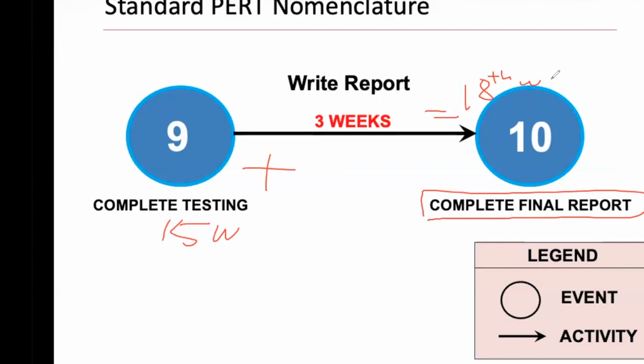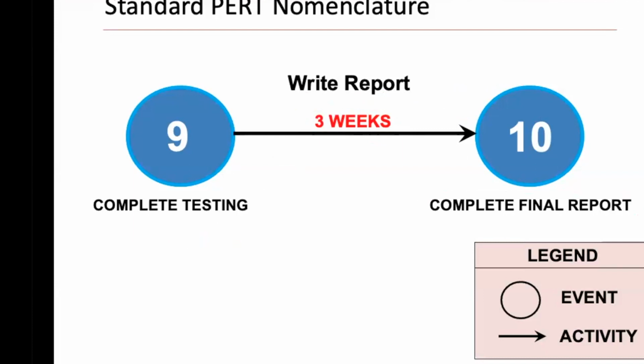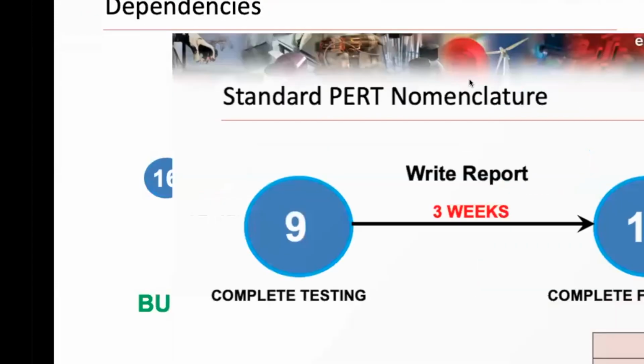So we don't attach calendar dates to these things because you never know. You're always late. One day you may be early, maybe late. So we say 3 weeks. We don't say from 1st of April to 21st of April. We always use generic periods. If you can observe, I'm making a transition from the WBS to network scheduling, to tell the boss really when you are going to be done, because that's one of the questions they will ask.